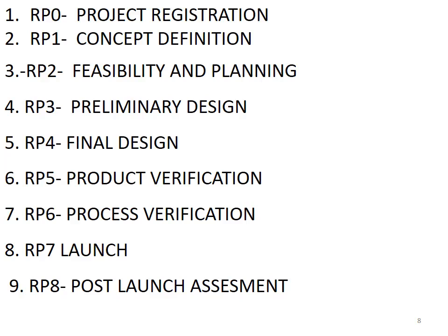what are the resources and capital required to prepare this product, and in the concept definition, they develop the project concept and charter, capture the voice of the customers, analyze customer needs and document the customer needs, identify critical to quality specifications, develop and select the concept which suits a particular product, and update the project risk.